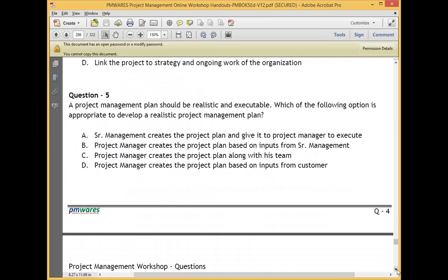Probably, when you are preparing a development plan, you may not involve the testing team because they may not be that concerned about it. Maybe you involve a test lead. But when you are doing the testing planning, then you involve a tester also, the testing team also, so that you can select who are part of this planning. The concerned people who are going to execute should be part of the planning. Then your plan is perfect. Most of the concerns will be addressed.